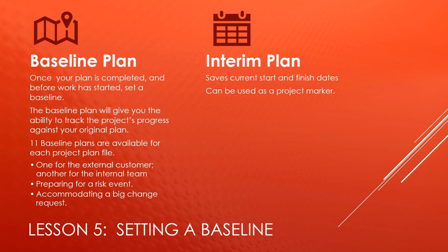Maybe you're preparing for a risk event, so you have an alternate plan in case some things occur and it impacts the project. Or you know that there's a big change request that's going to be implemented on this project, and so you want a baseline of your original plan just for future reference. So those are some of the reasons why you would have multiple baseline plans.